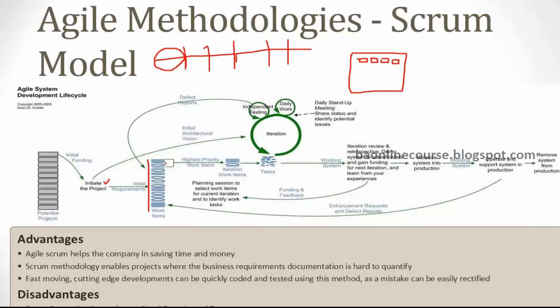Okay. Now that is called prioritization of your requirements. We call this a product backlog. I'll explain about the jargon and all when we get into the detailed session. But broadly, we are prioritizing our requirements, and then the topmost priority requirements are handled in the first iteration.